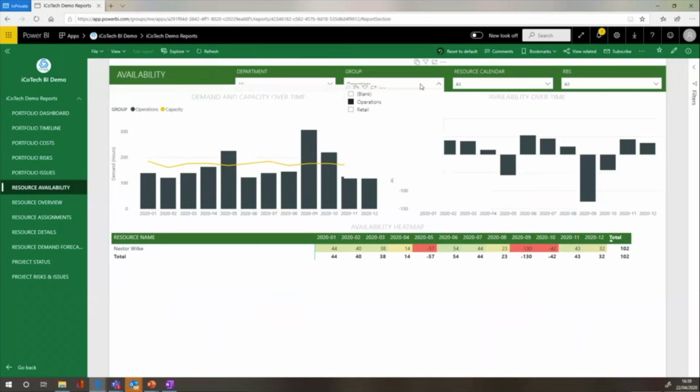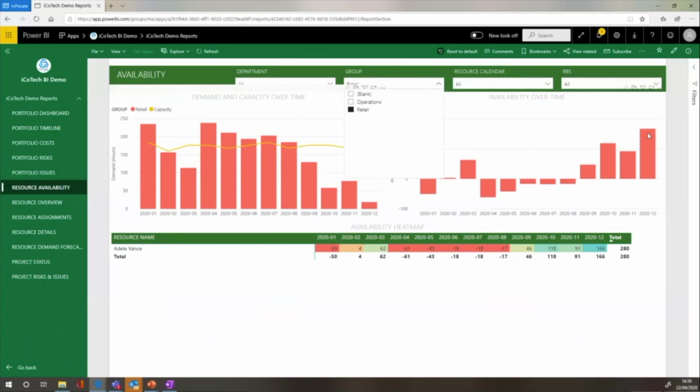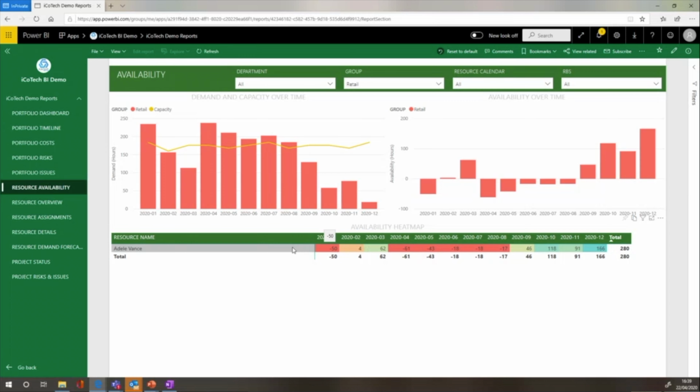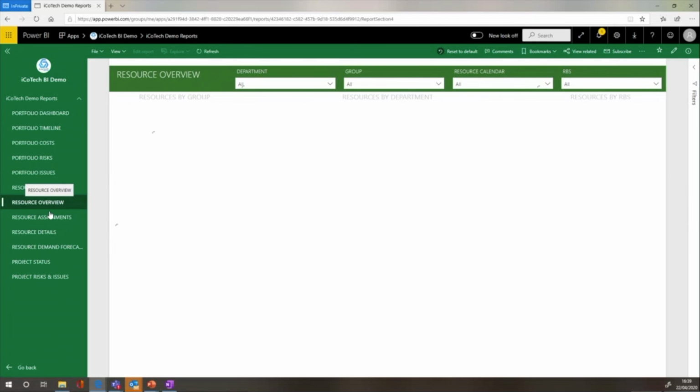Let's use the other one because it's a better example. So yeah, it's effectively a list of resources. I would have hoped it had more resources assigned to retailer operations, but you can see I'm over capacity here. This resource is plus 50% overutilized across these months. You can go into much more detail.